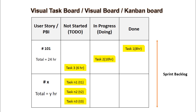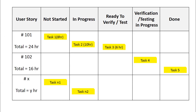Note that there is an agile methodology called Kanban as well, and that is different. Now imagine such a visual board for your ongoing project. Any stakeholder on any day can see this board to visually understand the progress of the project — impressive and effective. Now just one more thing to note: the number of columns in the visual board is not limited to three statuses. The team can add more columns based on their need.